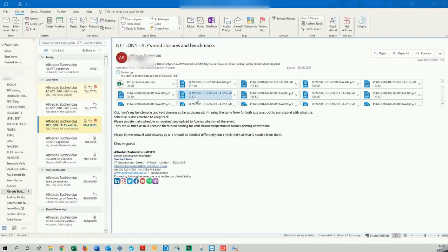So missing out some of them, say for example when the project ends and you're trying to sort out or do an audit for the document, or there's a dispute on why certain things were not done according to requirements, and then there's a claim that, hey, we sent you this document, you can always go back and find out if you have them on your EDMS. But if you don't, then you're responsible, you're liable. You can't claim that this document actually came through to me.